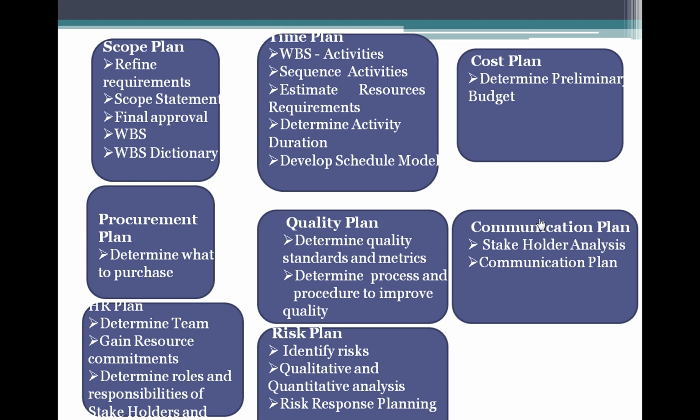So risk response planning will lead to what is to be done when a risk occurs. He documents that in the risk response and assigns who is going to work on it when the risk event occurs, and that resource is updated in the risk response planning.